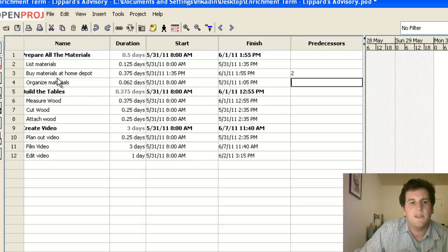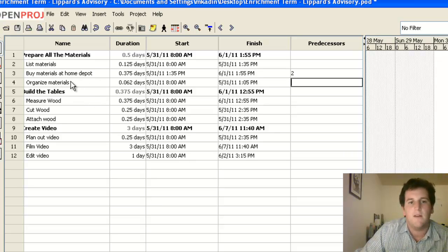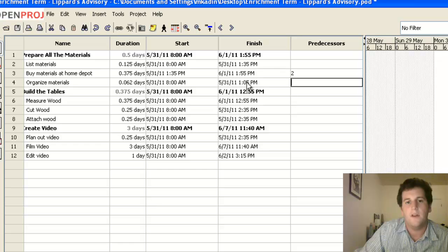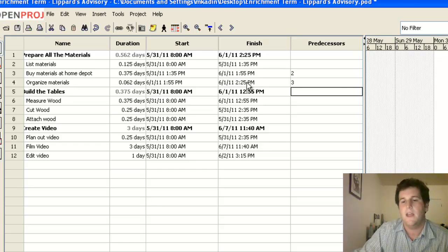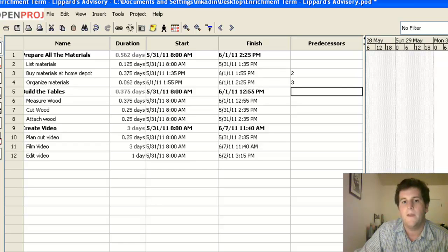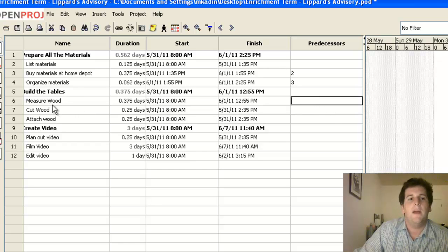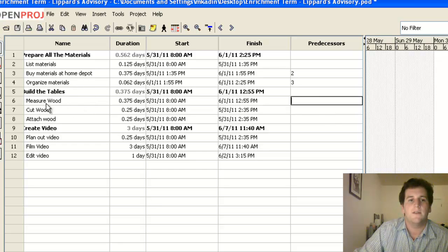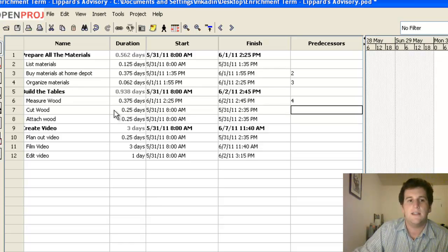And then down here it says organize materials. I can't organize them until I've bought them, which means I can't start number four until number three is complete. And then you can see the arrows forming again. And of course, I can't measure any wood until I've bought and organized that stuff. So I can't start number six until number four is complete.